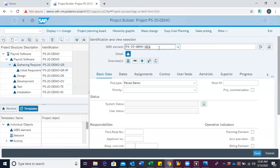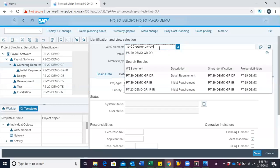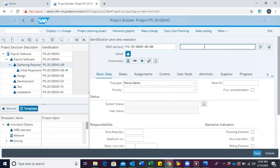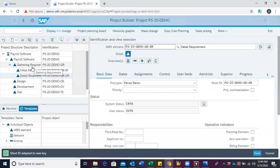I want to create detail requirements gathering under the same requirements gathering. I modify the code and add DR, and give it the description detail requirements, then hit enter. We can see it is created. Both initial requirements and detail requirements are level 3 WBSs, which are under gathering requirements, which is a level 2 WBS.